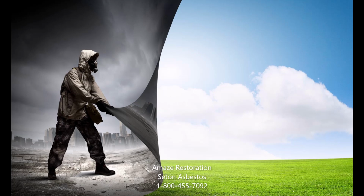Seton Asbestos Air Monitoring. During an asbestos abatement, air quality is monitored to gauge the risk level and ensure the safety of the workers as well as the public. This is typically done by a third party and not the asbestos removal contractor. Make sure when you are getting a quote for asbestos removal that air quality monitoring is included.